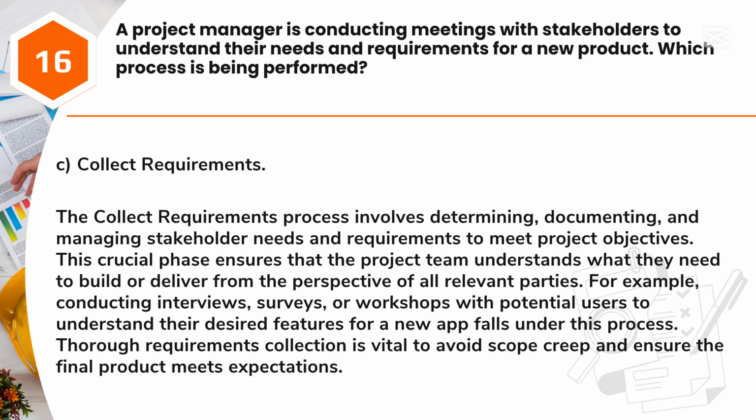Answer: C. Collect requirements. The collect requirements process involves determining, documenting, and managing stakeholder needs and requirements to meet project objectives. This crucial phase ensures that the project team understands what they need to build or deliver from the perspective of all relevant parties. For example, conducting interviews, surveys, or workshops with potential users to understand their desired features for a new app falls under this process. Thorough requirements collection is vital to avoid scope creep and ensure the final product meets expectations.